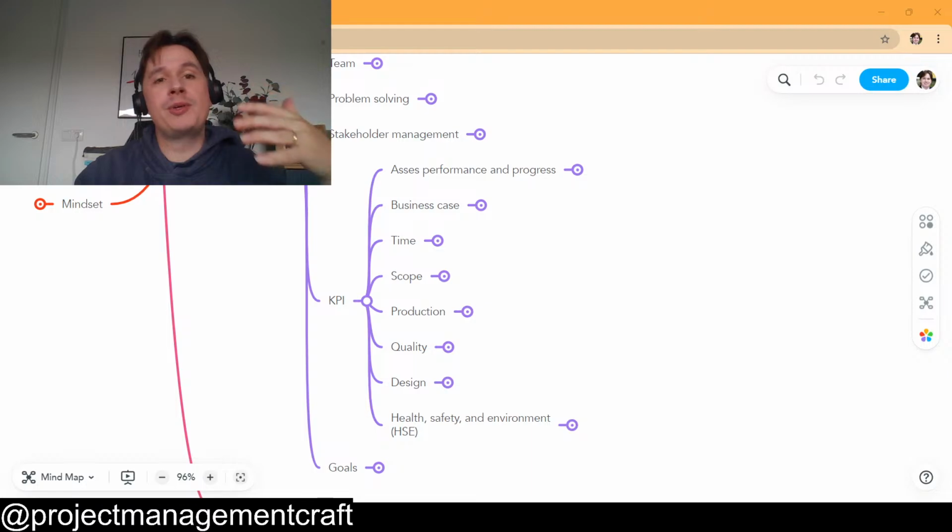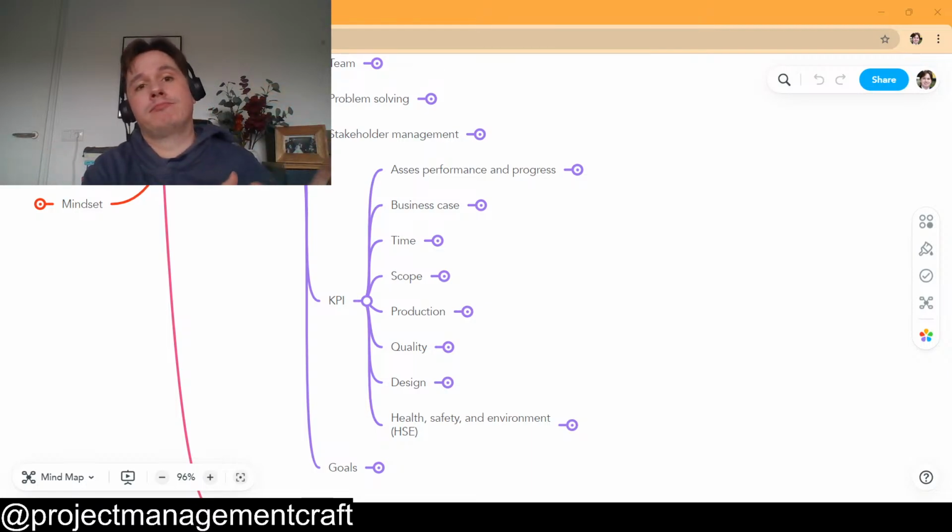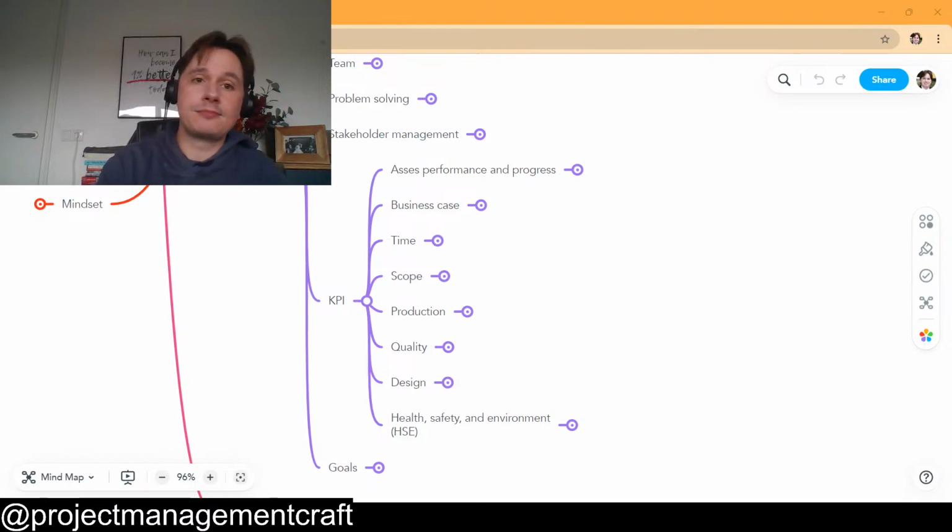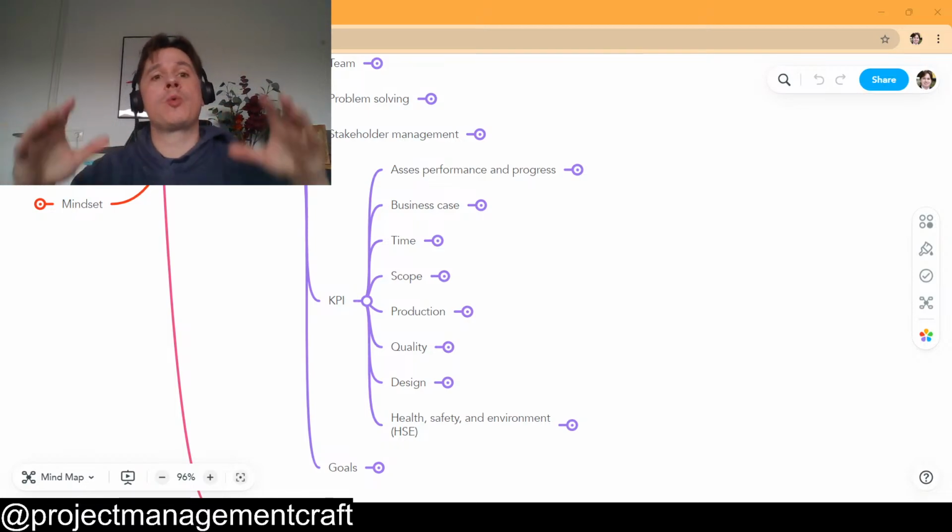And so they were doing that. What's the problem? That was delaying the entire project, because the design team was focusing on issuing drawings and they were not working to release drawings. This is another case of how the key performance indicators that you're setting, and how you're setting them, are quite important for your project.